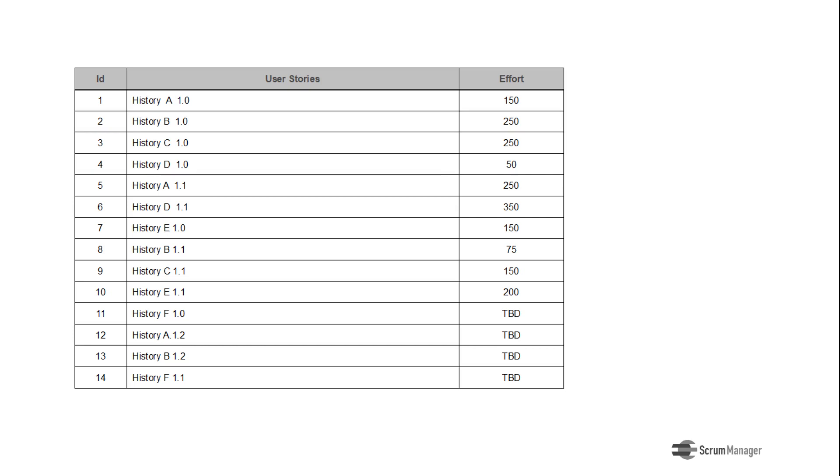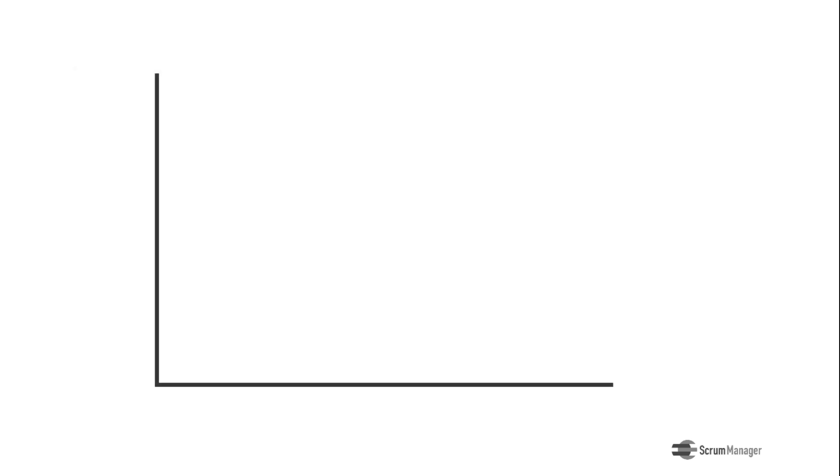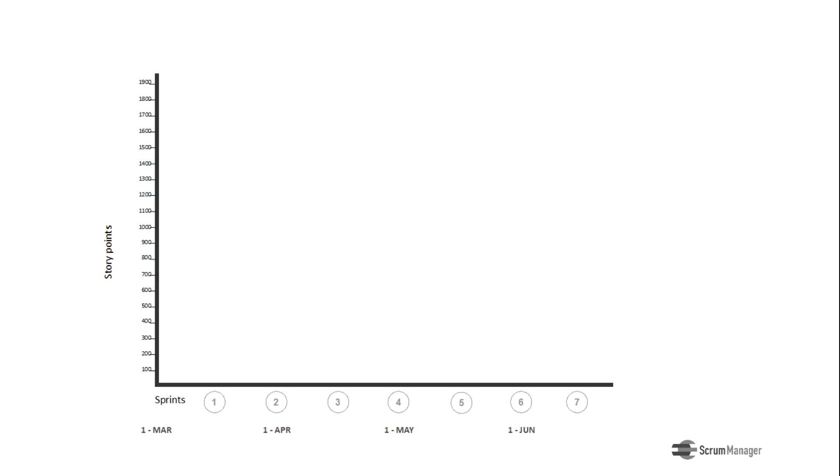The graph is drawn on a Cartesian quadrant, which represents in its vertical or y-axis the effort, measured in story points, and on the horizontal axis the time, represented in sprints and or the corresponding dates.